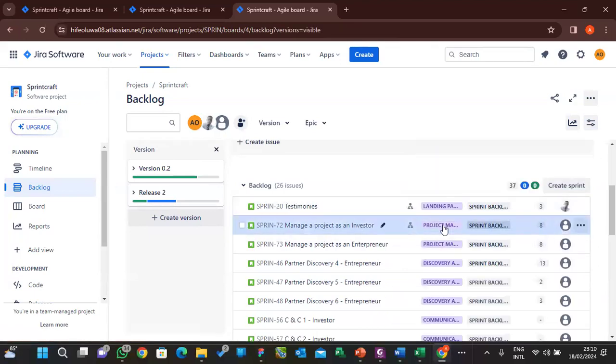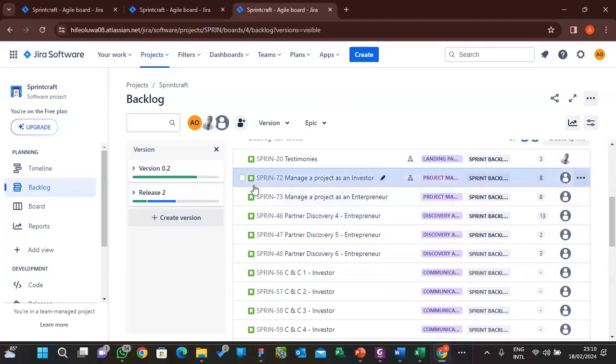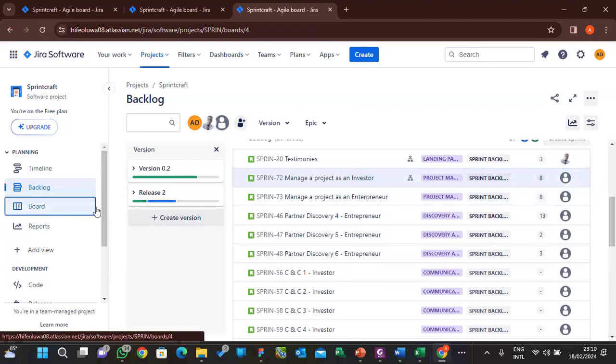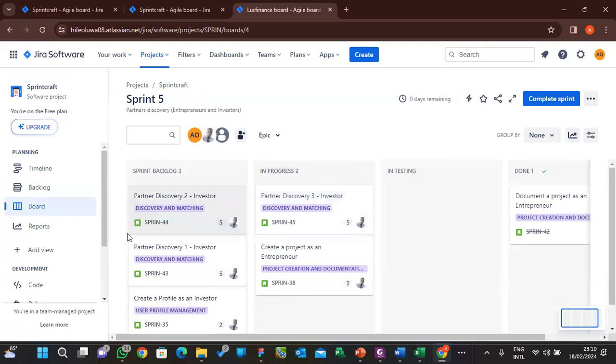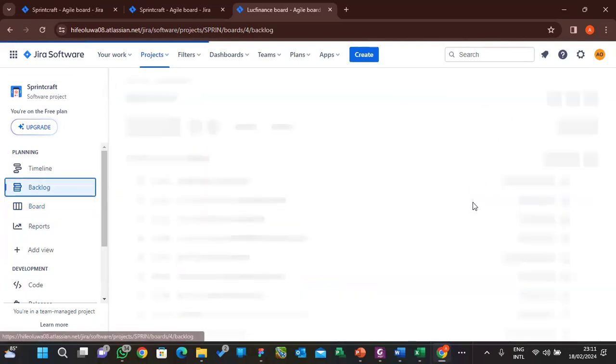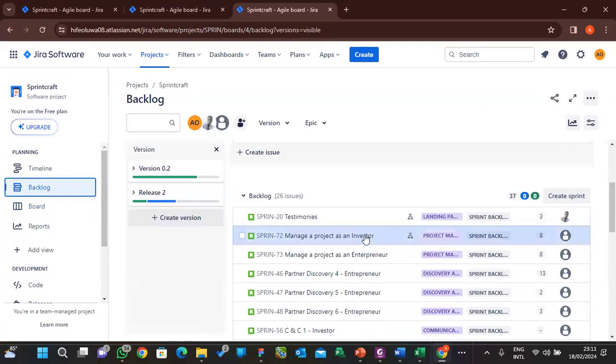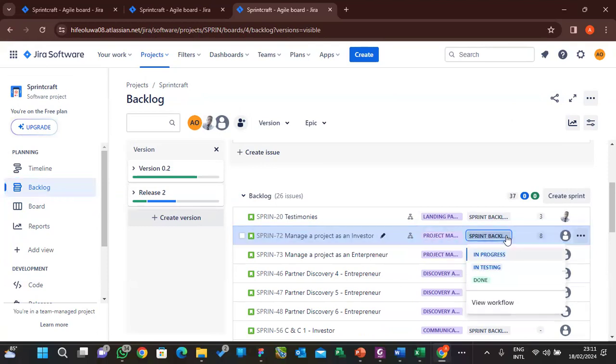But the user story is the real estimate for all the work here, right? Now, unfortunately, Jira will not be able to do that. What you are supposed to see on this board is this: for this user story to be complete, you can see you have some subtasks. That means you have 2 issues that you must complete before this user story can be moved to done.